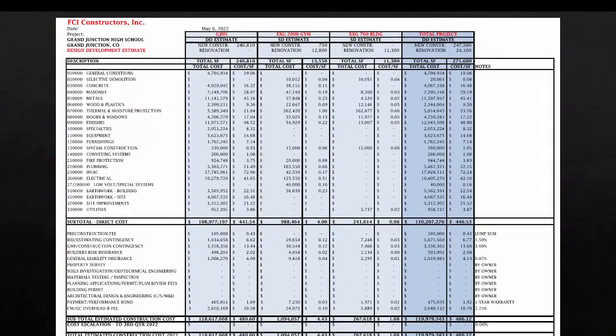Copper, we're expecting to see copper. Some people projected copper is going to double. That's what we were told in those interviews, that copper will double in the next year. So the electrician has some ideas to buy bulk copper. You don't have to have the wire size figured out. You just order it by the pound, basically, and the wire size will fluctuate. So trying to get some of those things going right away to avoid cost increases is a pretty big deal.